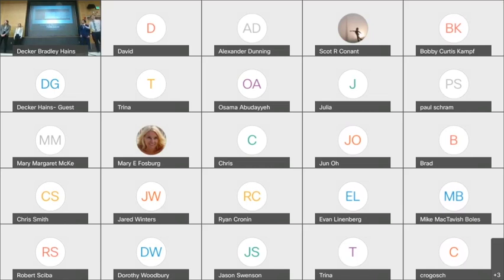Each item was scored on a scale from 1 to 5, weighted based off the needs of our developer. The cost per parcel was given a weight of 50%. This was the main reason for our analysis. The constructability and potential for expansion were both given a weight of 20%, as these both pertain to the future needs of our developer. And sustainability was given a weight of 10%, as with any good design, this is an important thing to factor in.